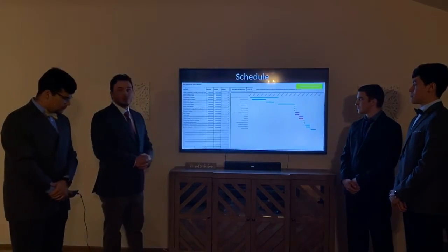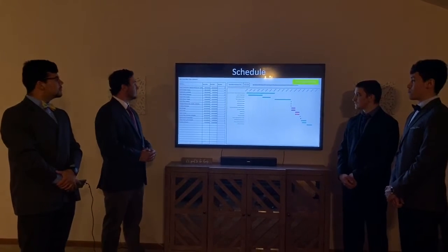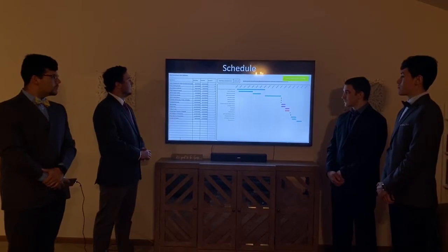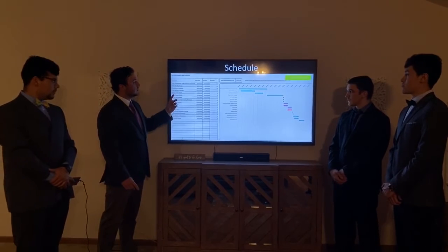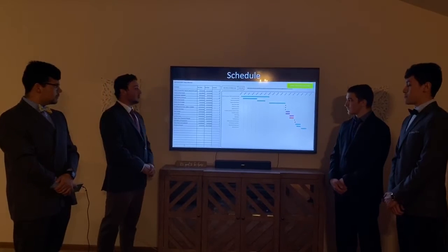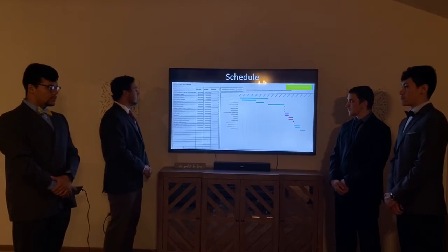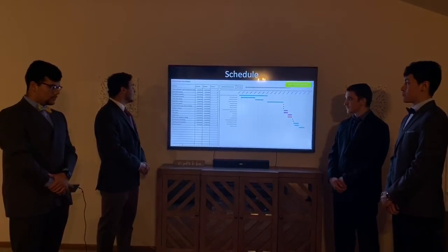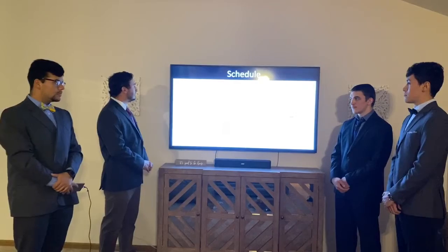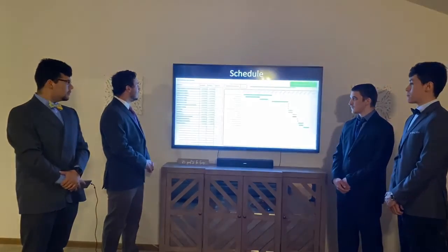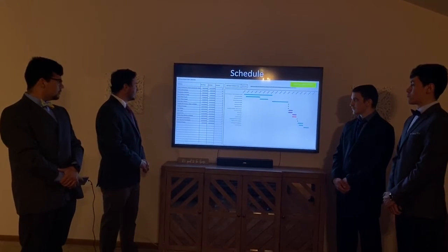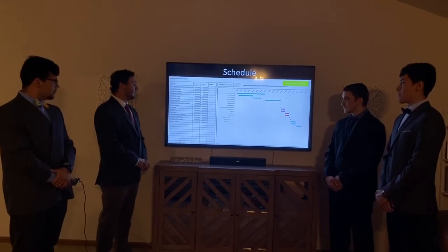So here's our schedule and basically where we're going to start and end with this project. Most of the time taken up will be 4 to 6 weeks for ordering and waiting on the arrival of the parts, which will begin August 24th. Once the parts come in, we intend on starting to assemble this around October the 12th, and we intend on having this built and completed by November the 10th.